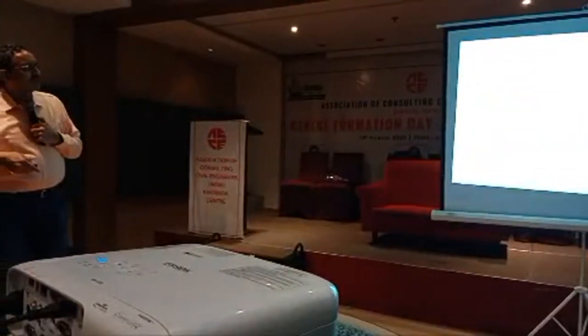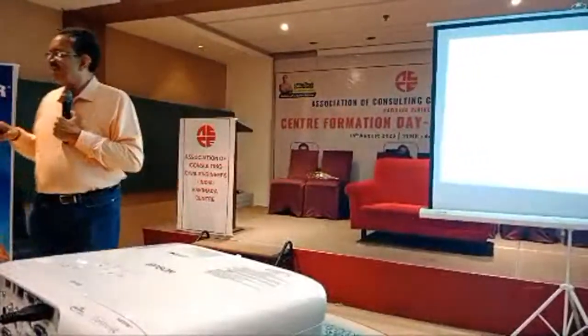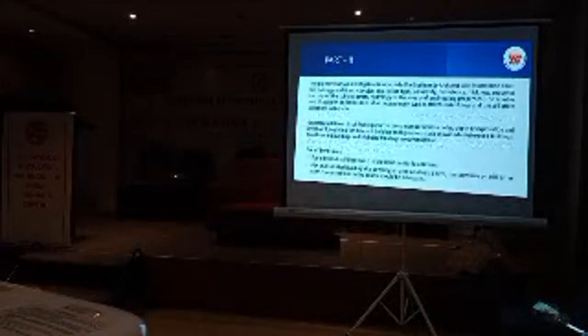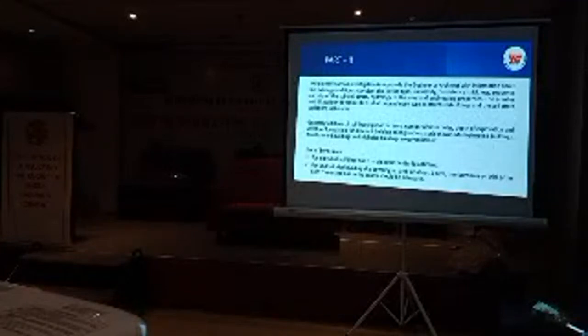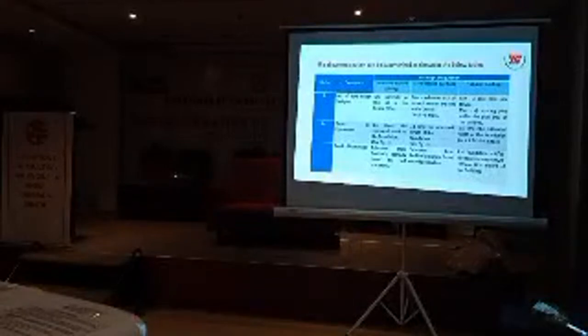So this is the flowchart of inception phase. This we have prepared about 25 years back in our office for project management, and then pre-construction phase, site analysis report, preliminary inspection reports, investigations, and then soil investigation studies, number of boreholes to be done. We have given all that in the SOP from the codes only. It's not our invention. And then depth of exploration to be done, and in sloped grounds particularly, 3D and 5D kind of clear distance between the footings.